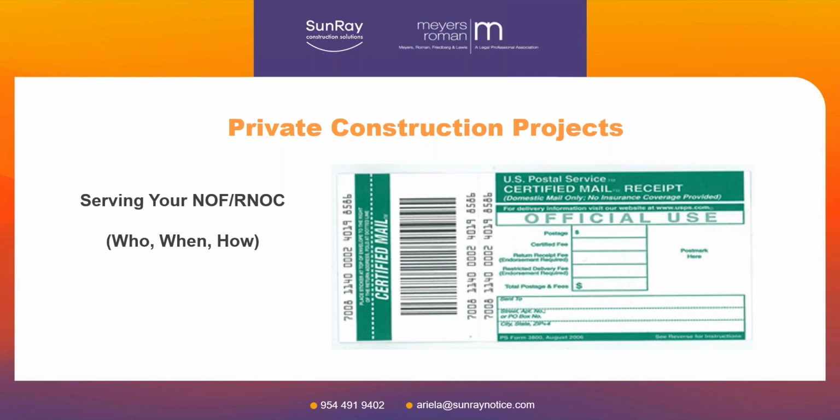Oh, people say, well, I can send it by email. Well, email doesn't get a signed receipt back, a written receipt back. Maybe you get back a receipt from whoever your email carrier is. But that's not good enough, because it might not have gone to the right person. The right person might not have opened it. They may have never opened it. And so that's a problem. And then the next piece is, if you really, really, really want to get it there, you can have a courier take it over. But that's more expensive than just mailing it certified mail.